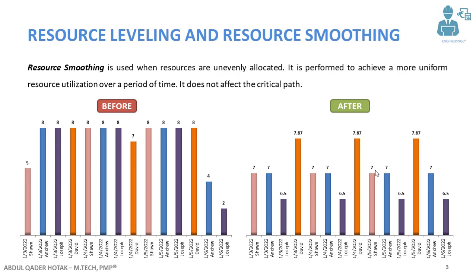For Andrew: Andrew works eight hours on January 3rd, eight hours on January 4th, and four hours on January 6th. What we have done here is deducted one hour from each of the eight-hour days, giving us three hours to redistribute.